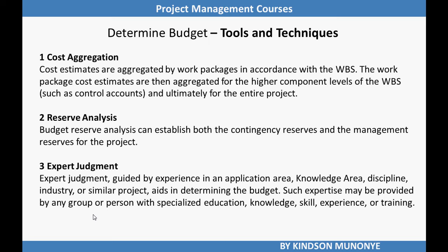Reserve analysis. We've discussed it several times in my presentations. Budget reserve analysis can establish both contingency reserve and management reserve for the project. Number 3, expert judgment guided by experience in an application area, knowledge area, discipline, industry, or similar project aids in determining the budget. Such expertise might be provided by any group of individuals with specialized education, knowledge, skill, experience, or training.